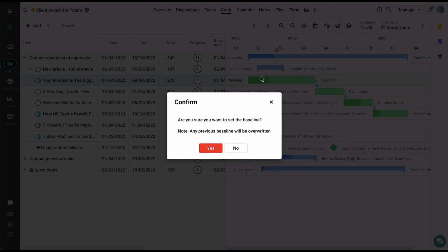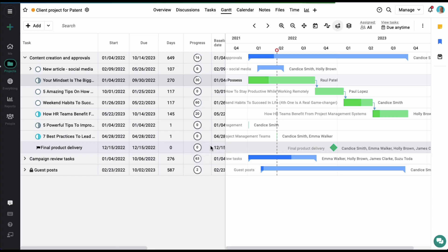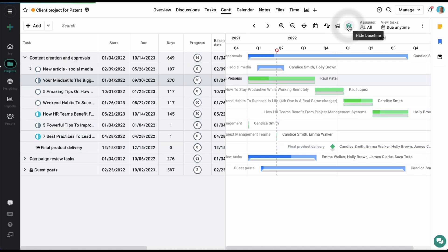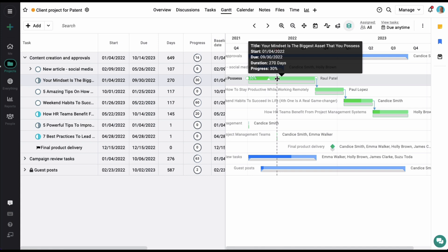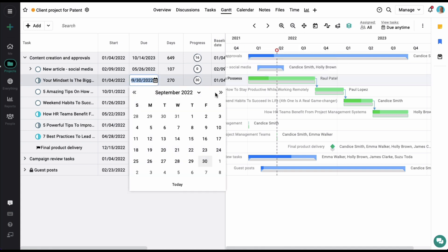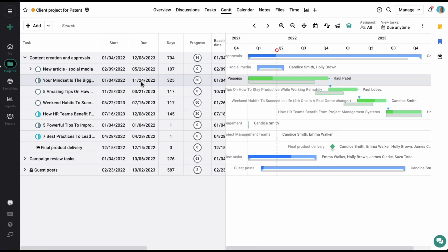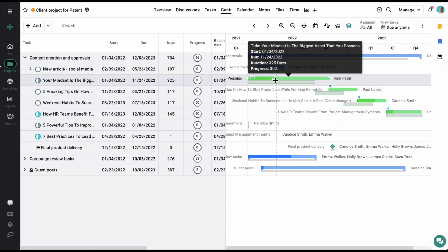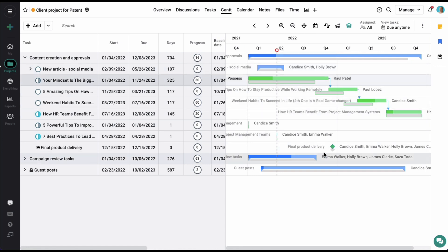Project managers can also set up a baseline for the project. If I click on this option and click on yes, a baseline has been set up, which means the actual or current start and end dates of the tasks are recorded. Clicking on this option will show the current start and end dates and the actual start and end dates. For example, if this task is moved forward, it shows the current and the actual start dates on a single screen.